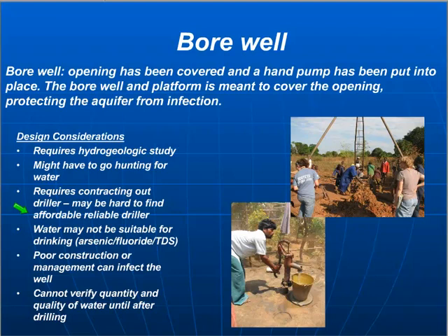And so you need to get to know these local drillers and figure out who would be appropriate to drill your well and what kind of qualifications do they have, and will you be able to have some sort of contract. I've worked with a chapter where the driller didn't have a good enough contract, and the driller didn't do a great job, and the chapter was kind of stuck with a well that wasn't usable. And that seems to come up more and more, and so it's really, really important that you have confidence in the driller you're working with, and that you have a contract so that you have something to hold them to. If you can get some qualifications or references on drillers, that's even better.